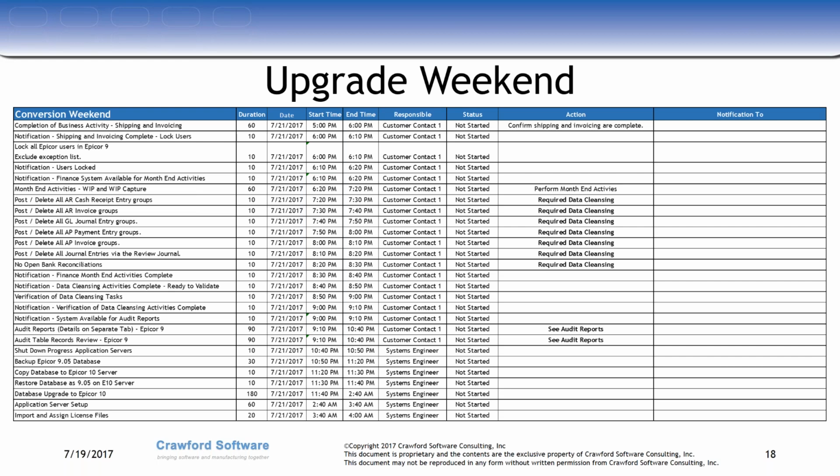I know I'm getting a little close on time, so I won't go through too much detail, but you can see in here we have the audit reports. And we actually have a different tab, which we didn't show on here, which shows what we recommend for the details of the audit reports to run. You're doing those pre and post the upgrade. Take that snapshot on the legacy environment before it happens, and we compare that snapshot afterwards.